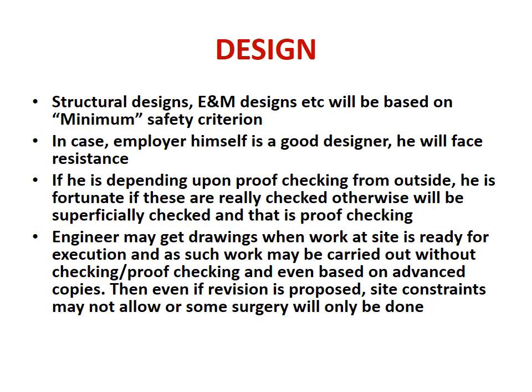And if he is depending upon proof checking from outside, then he is fortunate if the designs are really checked. Otherwise, they will be superficially checked by the proof checker, because he can't check all the design as he is himself doing the designing part. So proof checking becomes superficial, except in a few cases where they may really check it.